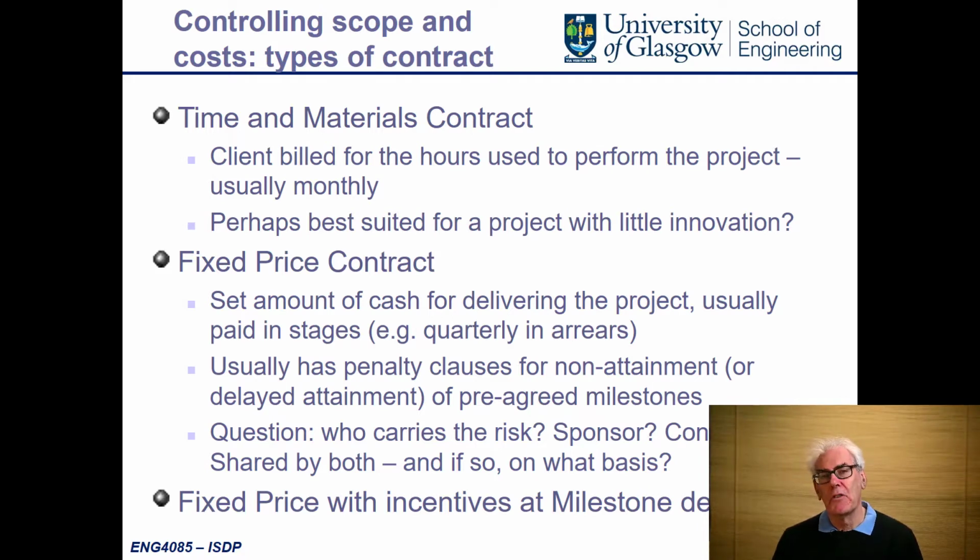There's different types of contract, and I won't go into the detail of time and materials versus fixed price. Time and materials is pretty old-fashioned and is virtually never used. Fixed price is much more common, and it's what most people would work to in modern industry. You define upfront how much the project will cost, what you deliver for that money, and the project will get paid either quarterly or yearly. Either way, you need to make sure that you've estimated your tasks very carefully. And it's imperative that the people doing the work estimate the task.